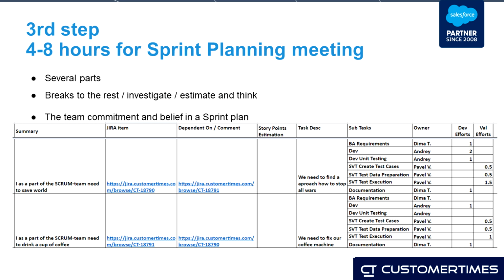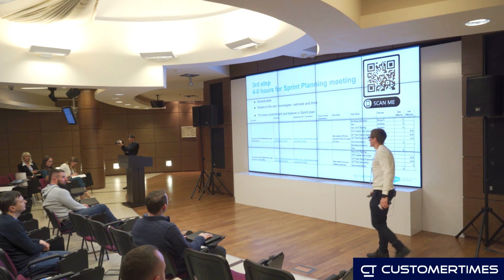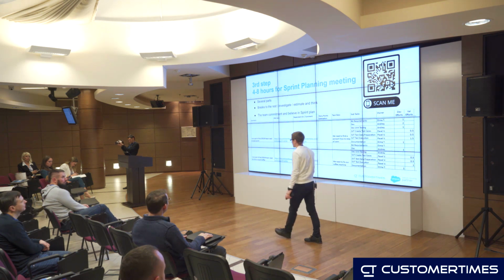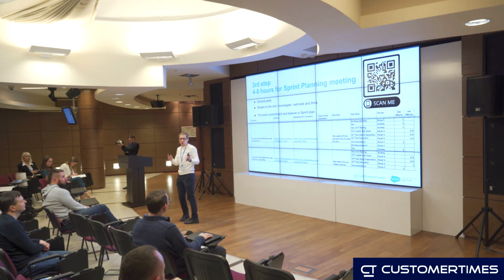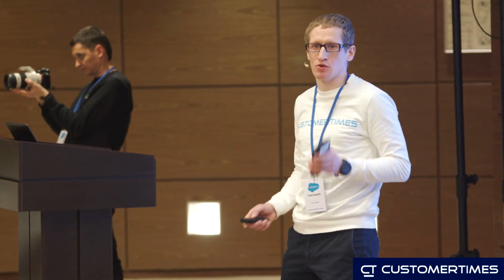Of course, with breaks. In my team, we usually organize it in such a way. We gather all together in the morning, including the product owner, and include not only developers, but also QA engineers, business analysts, architects and the dev lead. First, we explain our sprint goal. We identify which user stories cover the sprint goal.